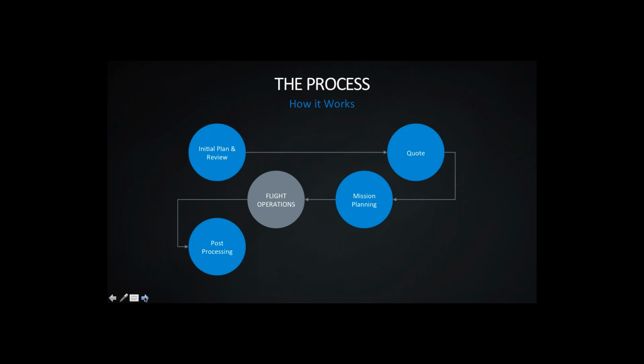Post-processing might be the longest part of any operation. It could be a couple of hours to do some post-processing for a simple ortho photo or a 2D model, or for a complex point cloud data set, it could be a couple of days. Typically, turnarounds are overnight. You're spinning up several servers to run these large data sets using photogrammetry packages, so it's usually overnight.